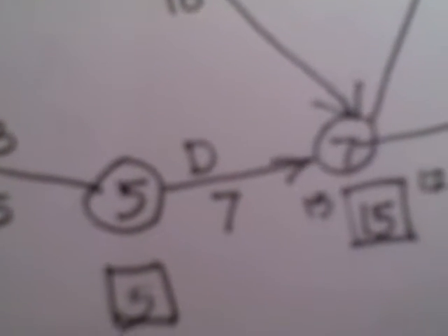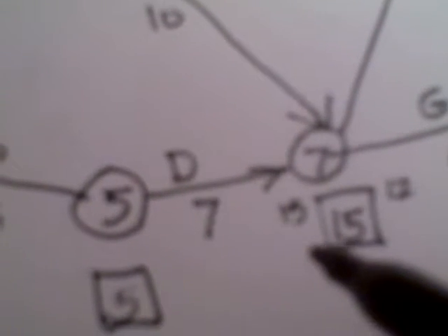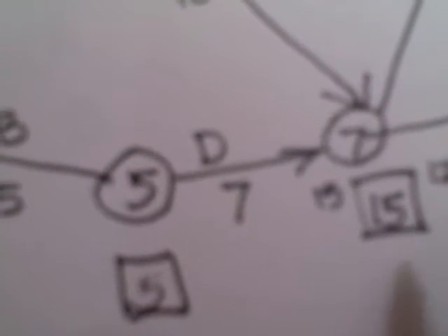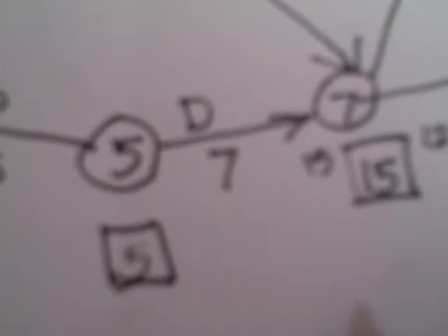So these activities leaving this node cannot start until the latest of the precedences are finished. So we take the maximum. When there's a choice, just think of this rule yourself. When there's a choice, as there is here, I can tell because there are 2 arrowheads, I'll take the largest of those 2. In this case, it was 15.